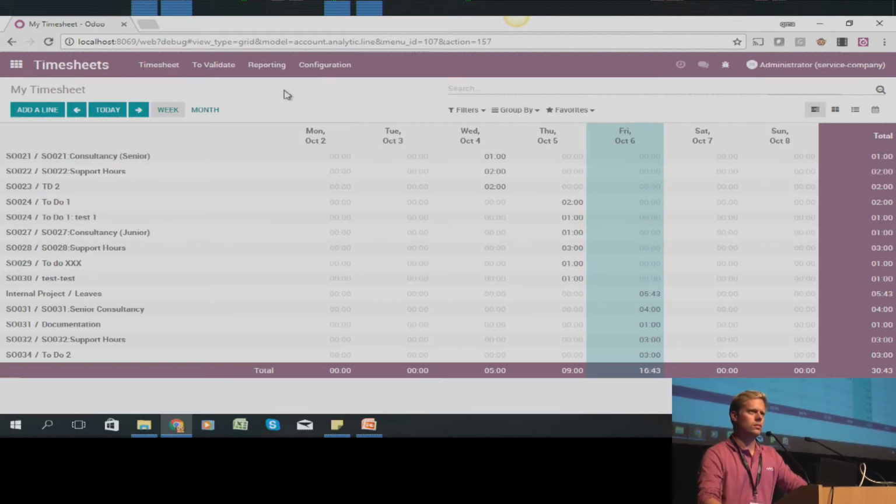What happens if I want to timesheet 10 hours on a project, but I only want to invoice 5? How is your product or service configured in that case? It's a project with a task. People are timesheeting on this task, but I don't want to invoice everything that I've worked. Okay. Simply, what you will have to do is not link that timesheet to this specific task.